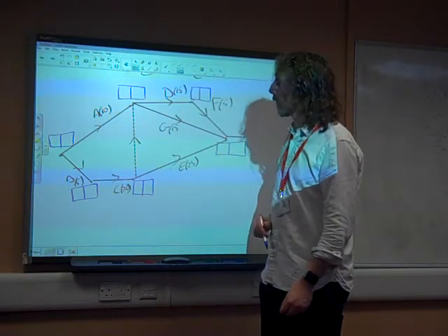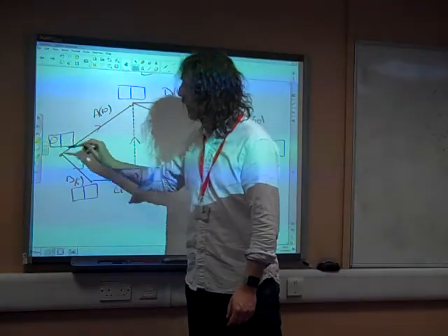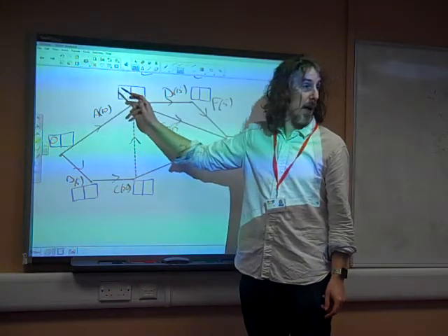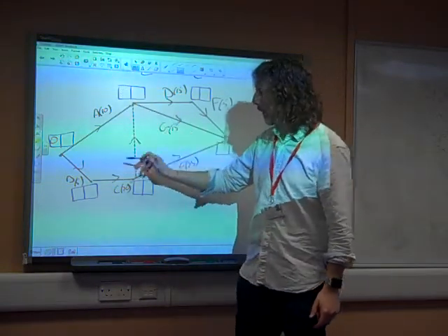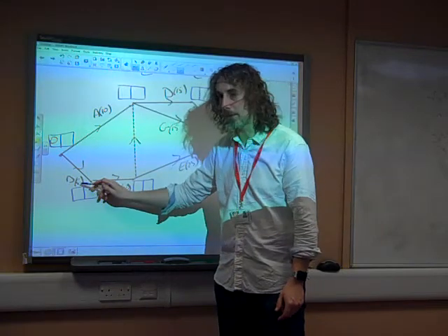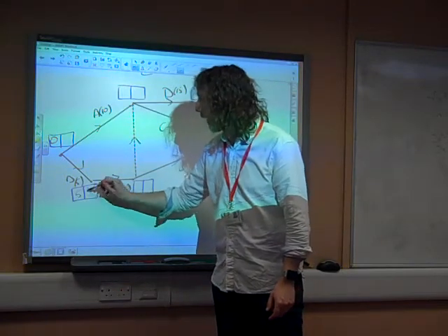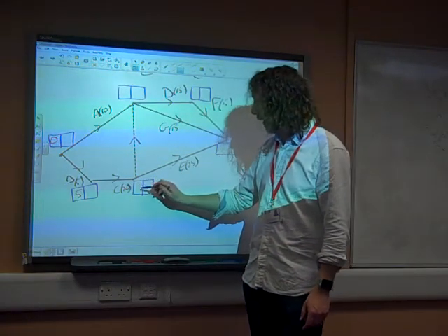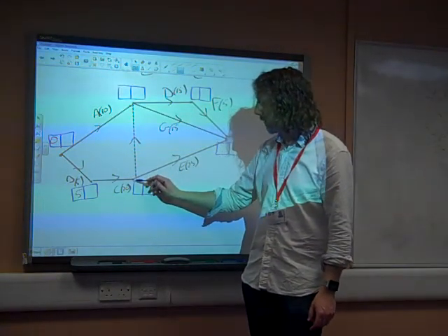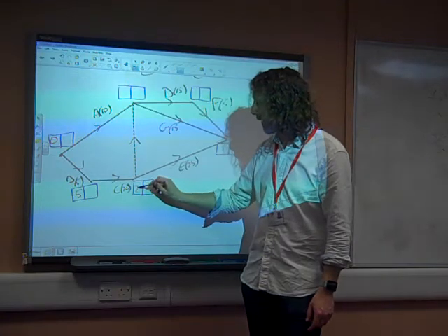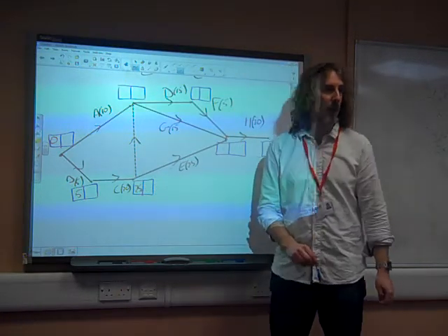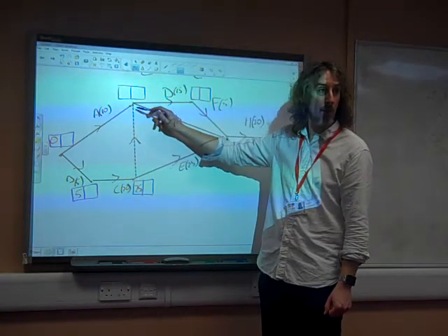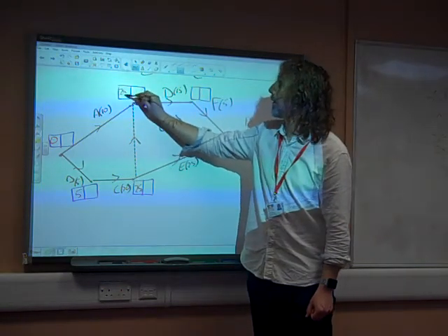So the forward scan, we have 0 there. We're putting the earliest time we can. We can't put that one in yet because A is involved in that loop as well. So this was that number 5 then? So that was 5 there. That didn't depend on anything else. C, we arrive at this vertex once C is finished, so that's after 25. So the earliest time we can arrive at this vertex is after both A and C are completed. So the earliest time we can get there is 25 as well.